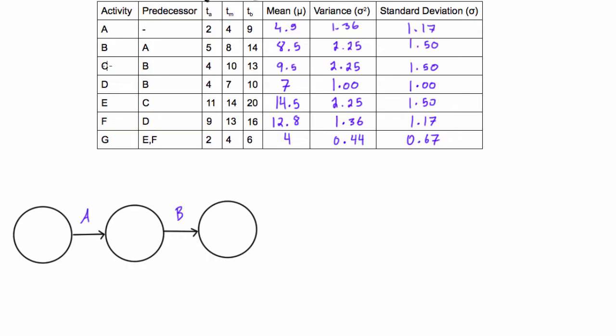Next up, we can see that activity C and activity D both depend on B, so we'll have an arrow coming up and an arrow coming down. Then we can see that activity E depends on C, so we'll have an arrow coming off of C, and then activity F depends on D, so we'll have another arrow coming off of D. But we can see that G depends on E and F, so these will both have to come down into one node.